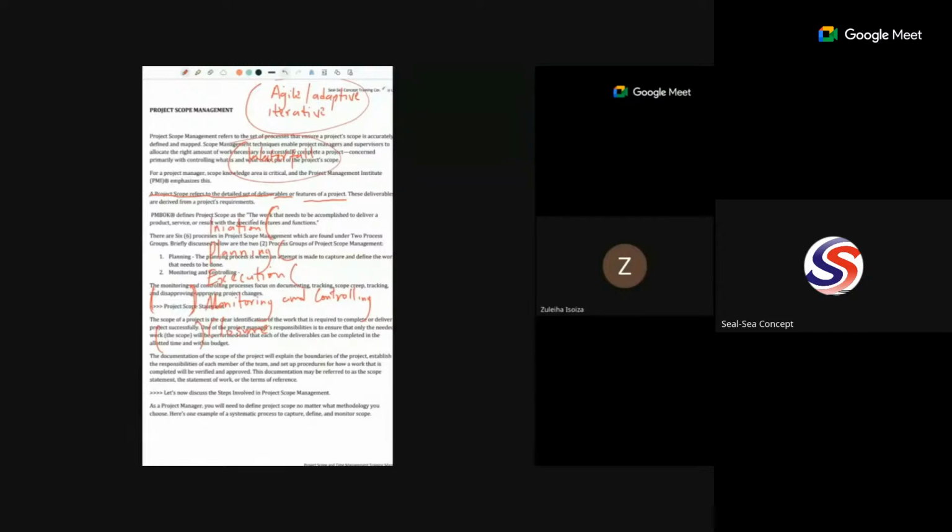The customer will not be satisfied. And the kind of corrections we will be pointing at, those are the things that will waste materials. That is, it will raise the project budget. And it will delay you the more. That is, it will elongate the project. There will be scope creep on that particular project. So you dare not use waterfall for a project that is of high risk or that does not have 100% clarity from the beginning.